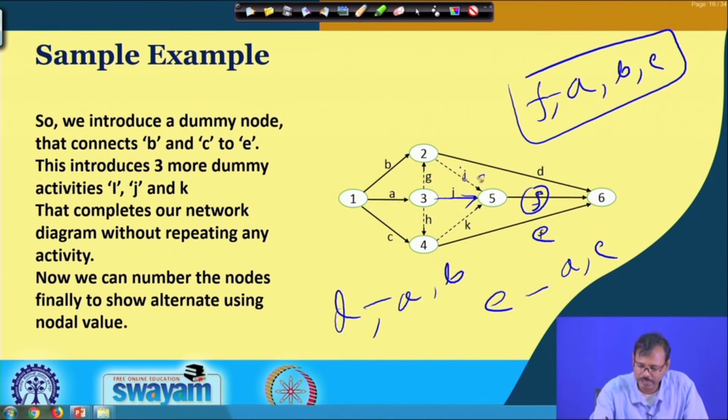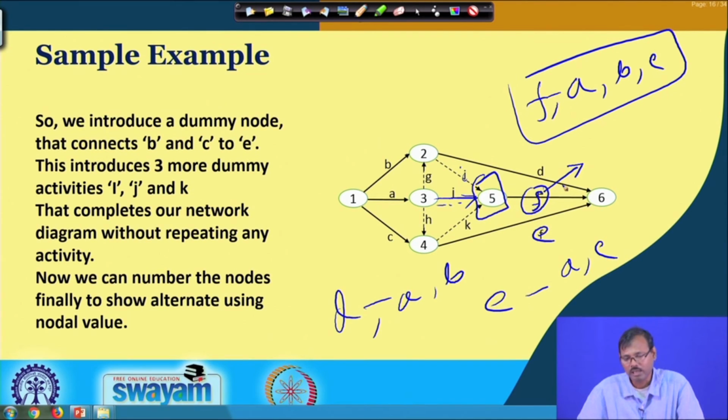So, basically by providing this additional node at this position and adding the dummy activities I, J, K to that node, we are placing an option for F, so that all the A, B, C can be the predecessors of F. These dummy jobs give us the opportunity to completely construct a very critical network, where n number of activities can be added as predecessors for an activity, though they are having other dependencies also. In fact, in real life cases the dependencies are very high, and that is why n number of jobs are acting as the predecessors of a job, and there are distance predecessors also. In consideration of that, a network has to be completed prior to analyzing the network for its optimization.